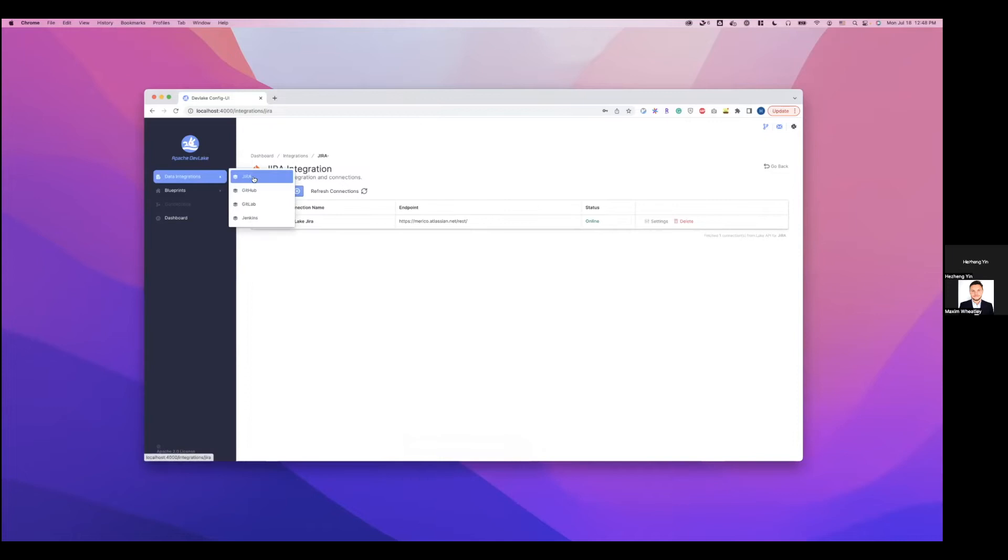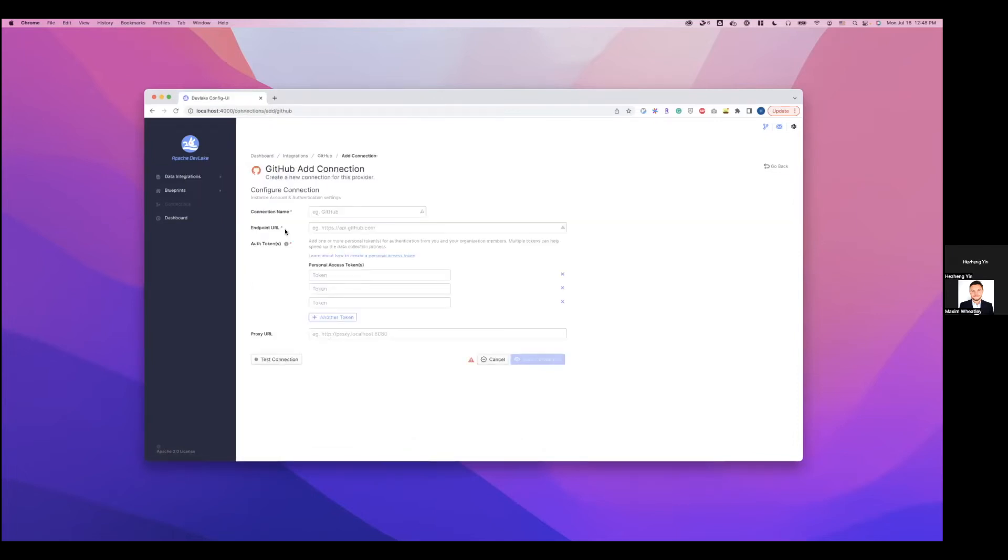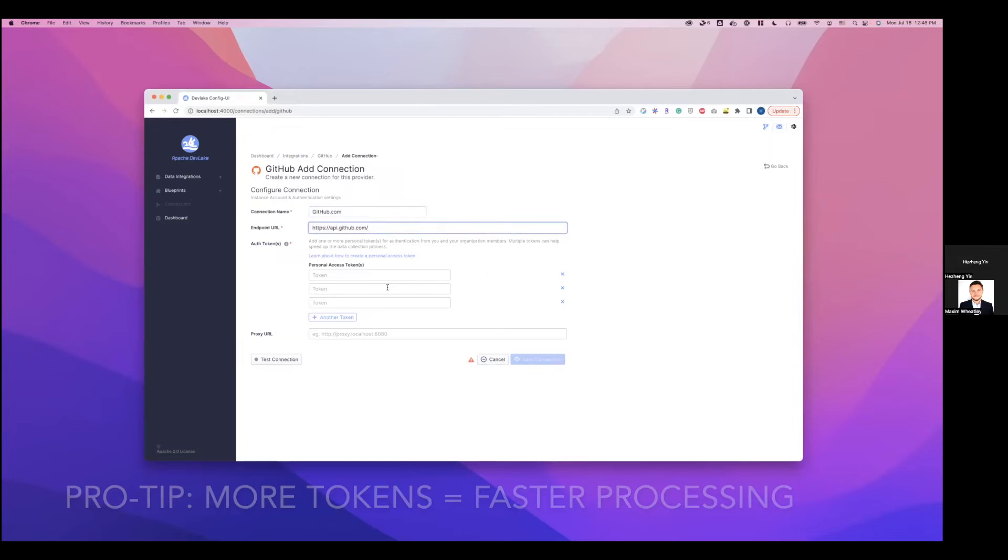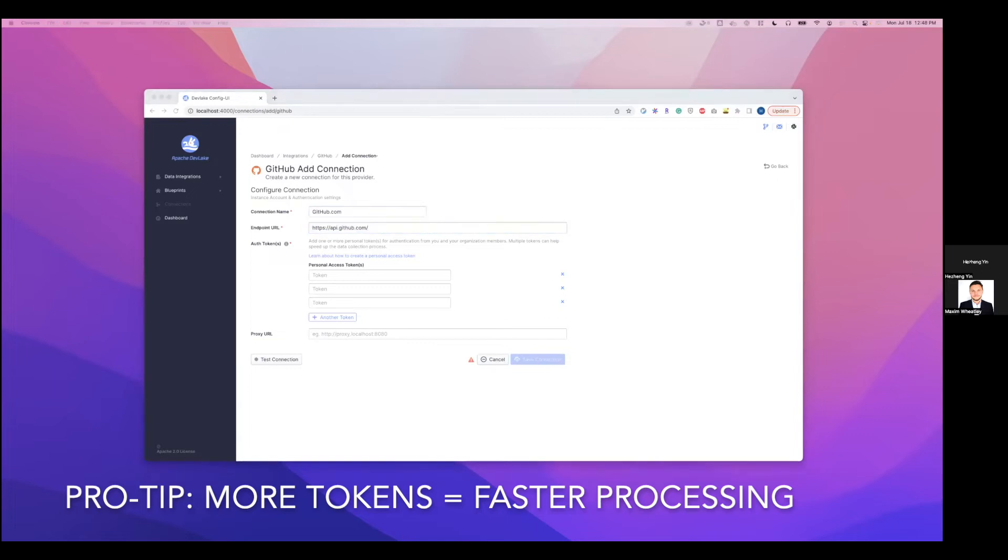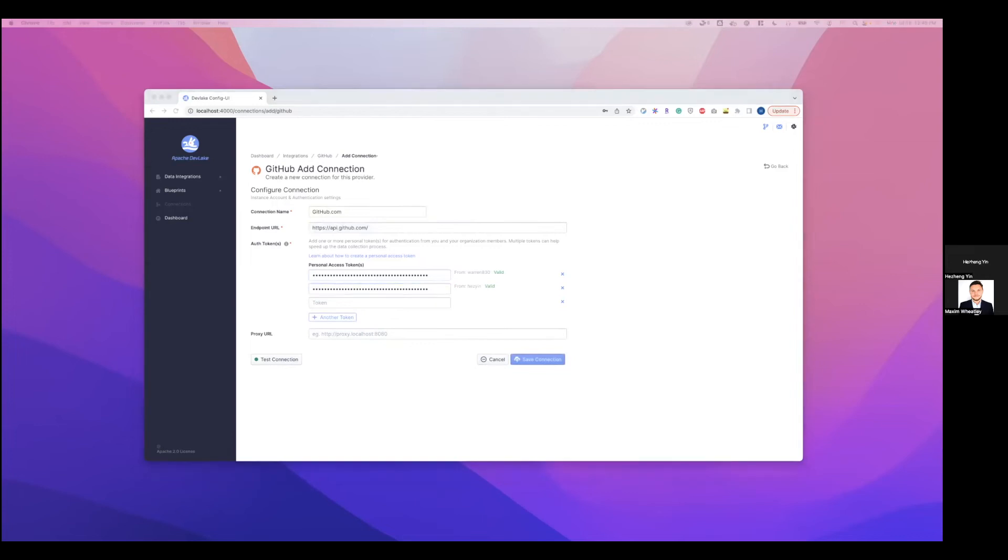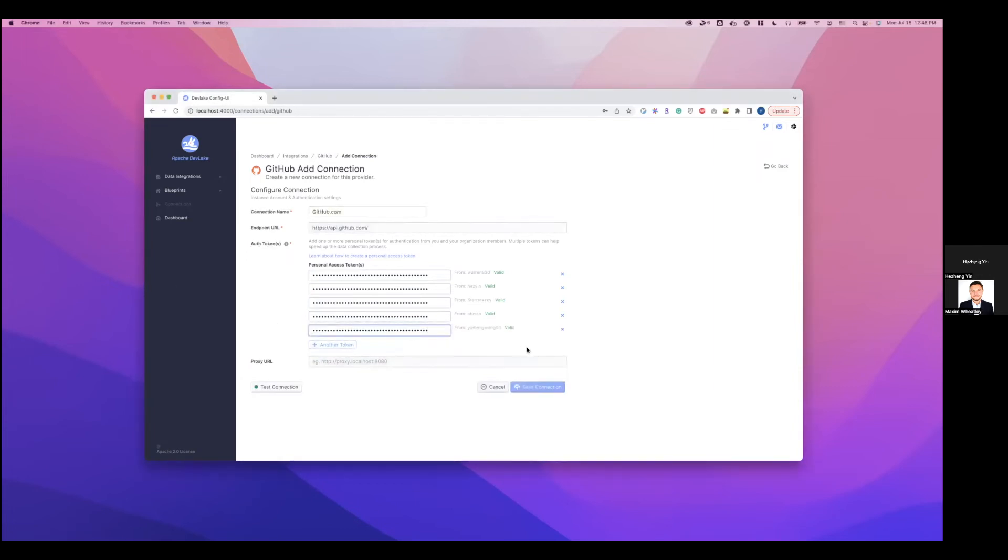Next up, we're going to create a connection for GitHub. Also add a connection here. This is just GitHub.com. And the API URL is just api.github.com. And because GitHub has a very low rate limit, it's 5000 per hour per token, we're going to add multiple personal access tokens here to help DevLake speed up the collection. I'm going to add five tokens here. Okay, and then again, test connection and save this connection.